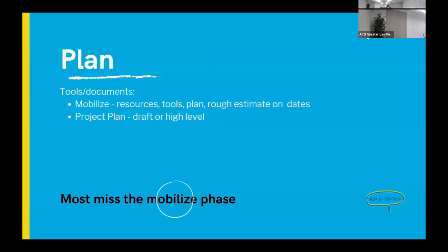This is the, hey, let's pretend they give you a few months to do this, okay? Hey, I need a leadership training to do X, Y, Z. Here's who I'm sort of thinking about. This is what I want to solve. Great. So they've told you some guidelines. Now it's like, okay, let's go out and find those subject matter experts. Let's figure out when and where we want to deliver and maybe some software. And then let's put together a high level timeline or project plan, however you want to think about it.